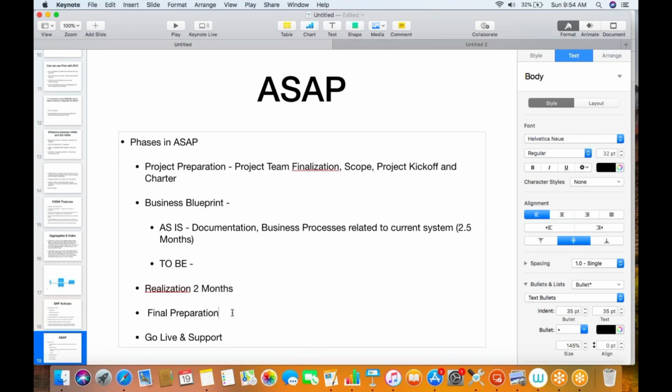And that is where the surprises come in the final preparation. When they go for UAT, let's assume out of this 1 year of project, the UAT is only coming after 7 months, right? We are only left with 5 months now, and there are a lot of surprises in UAT. Customer will say, I never seen this, I was never expecting this. But you will say, no, we have written in the business blueprint, you signed. He will say, I never understood the business blueprint. These are the things which are very common, which are happening in each and every project.